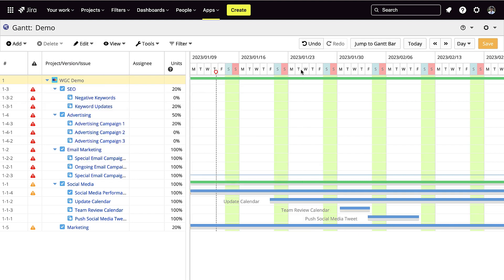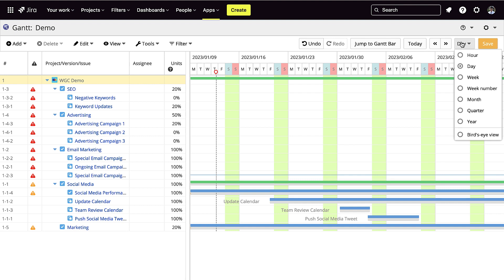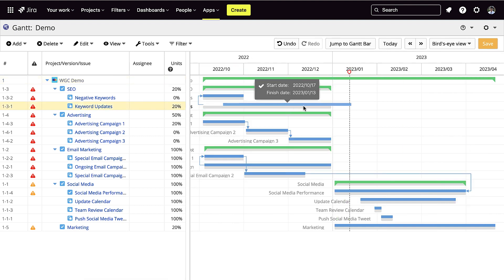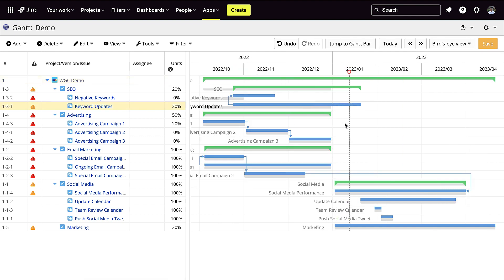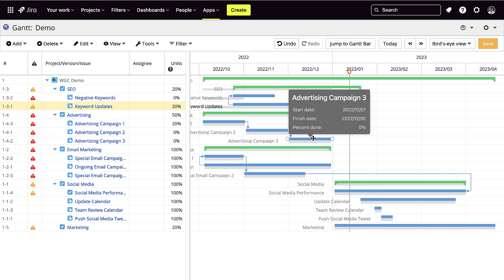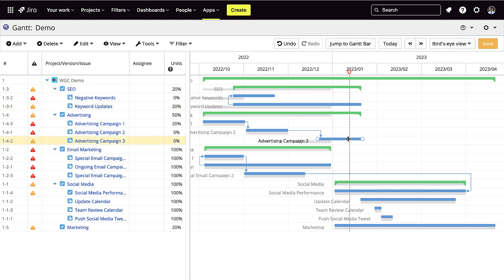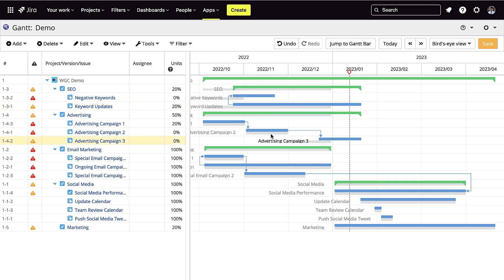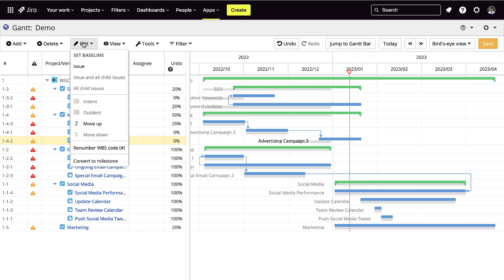The baseline should be set for the entire project. You'll see a gray line under each of the tasks. The baseline is a gray line that shows a snapshot of the entire project. You can also edit the baseline for a specific issue.